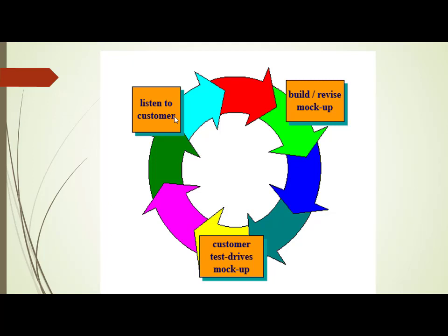Then he says, your model is around 65% complete compared to what I have told, but you have to make some more minor modifications here. So then he will give you those modifications. He will redo that particular model and once again he will give you one more prototype. Then you will run the prototype once again and show him. Then he says, my prototype is perfect. Then you will approve that particular prototype. This is called a prototyping model.